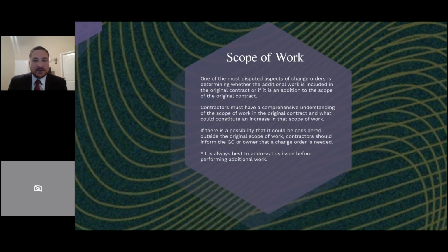Okay, so now we're talking about the scope of work. Where this comes into play is, you put in the bid, and then if you award the bid and you sign the contract, first, you want to make sure that the contract you signed has the scope of work you agreed to in the bid. It may not always be the same, but that's what you're going to be held liable for,